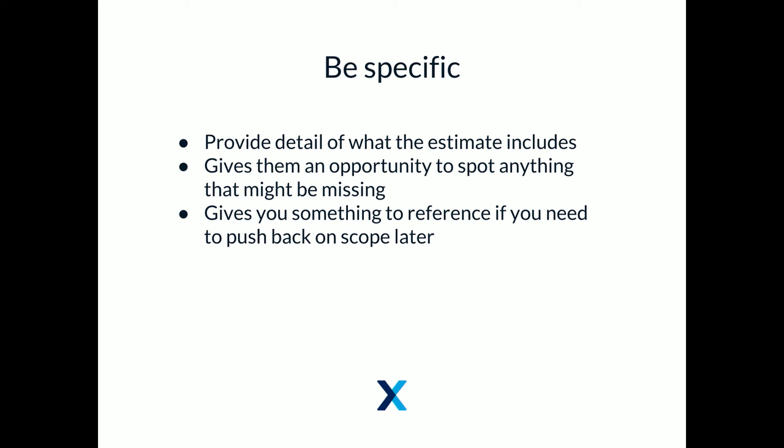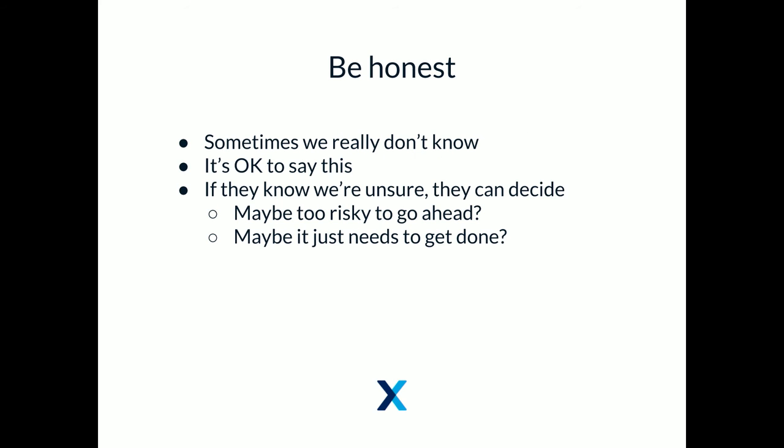So provide specific detail of what you're planning to do. And again, in the Read Speaker example, that would have helped because it might have triggered a conversation with the client to say, well, adding the module, that sounds really easy. Why do I have to pay you $2,000 for that? Which is a valid question. And it gives them an opportunity to spot things that might be missing. I can see you've put these 5 things in, but we also thought we would get this. And then you say, okay, sure, we can add that and we can estimate that. And then also it gives you something to reference if you need to push back on scope later.